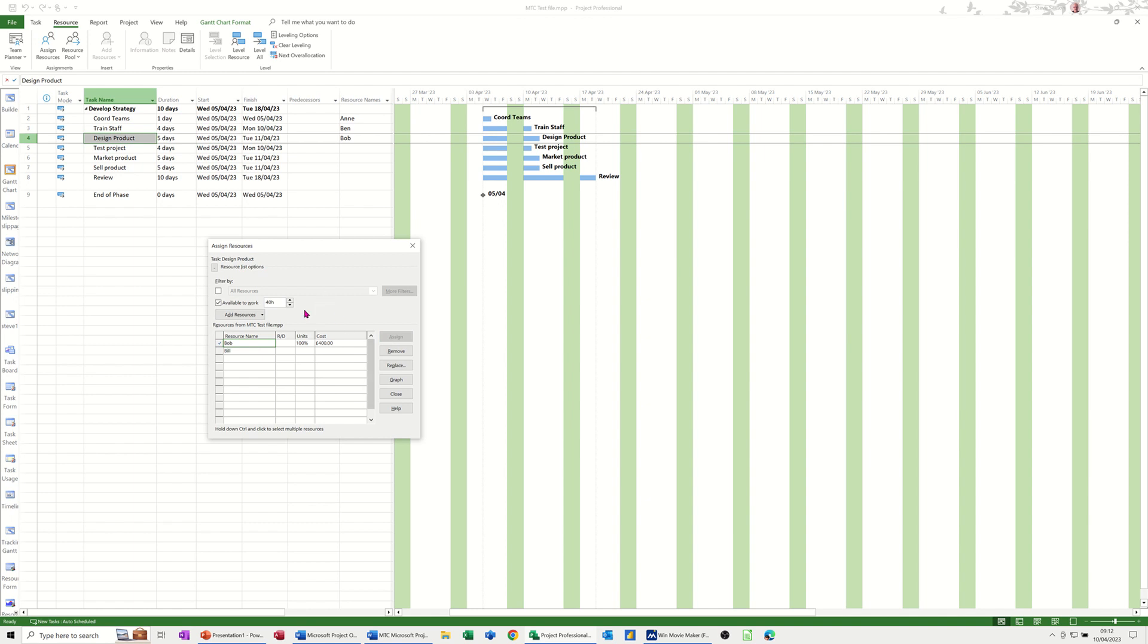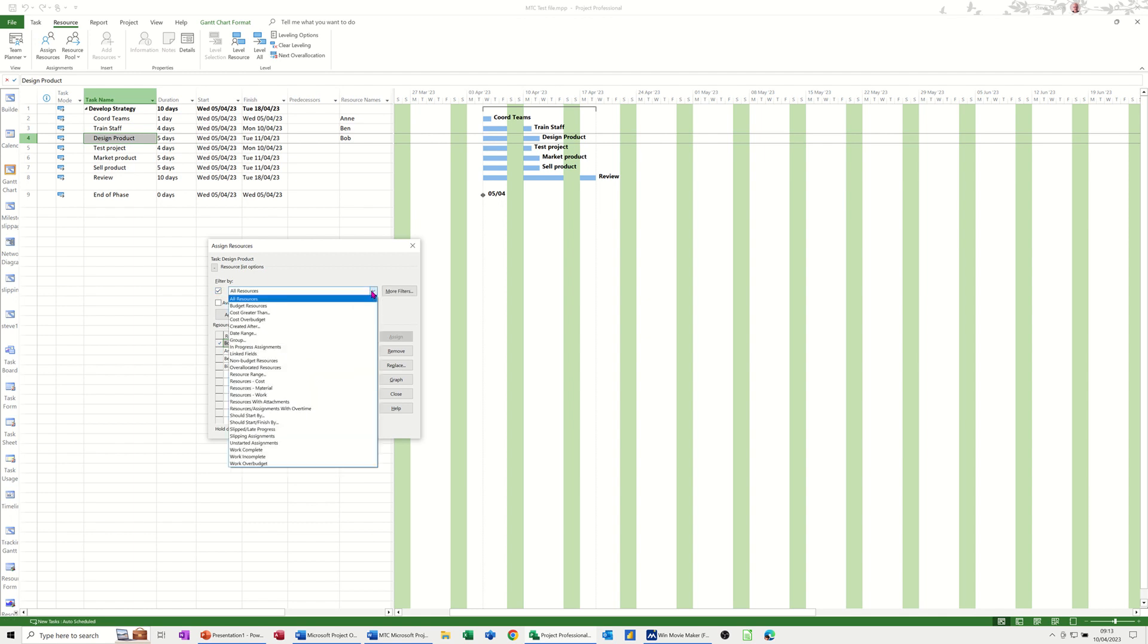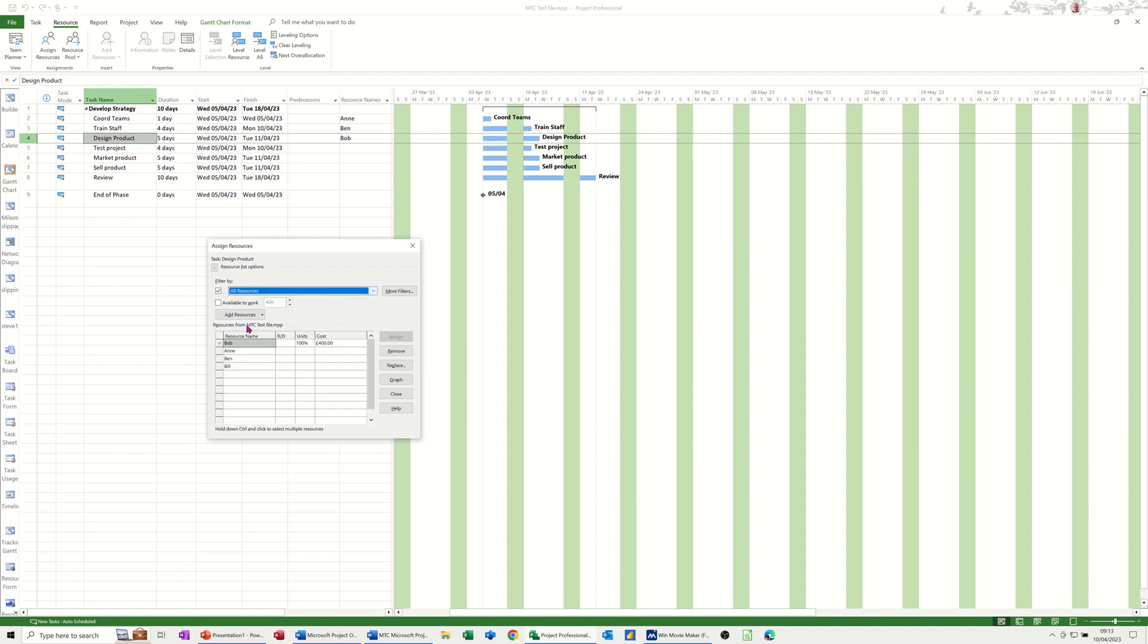That's what you can use - you don't have to use this, you can take that off and all the resources will be displayed. You can filter resources from this dropdown, which will give you options similar to the filter on the top there. It's quite a useful little tool to see who's available in terms of hours to carry out work on a particular task.